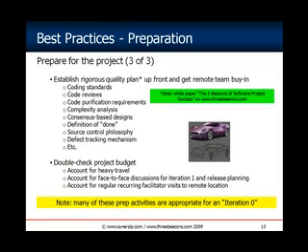Static analysis. There are a number of excellent tools out there which can give you insights into your code quality. And definition of done is very important, both from a user story perspective and at the end of an iteration, and even the end of a project. So a white paper on my website covers that quite nicely also, so feel free to download that. Finally, from a prep perspective, double check the project budget. Make sure you have accounted for the extra cost of the long distance calls, the video services, the infrastructure, the face-to-face meetings, the on-site iteration 1 development, etc.